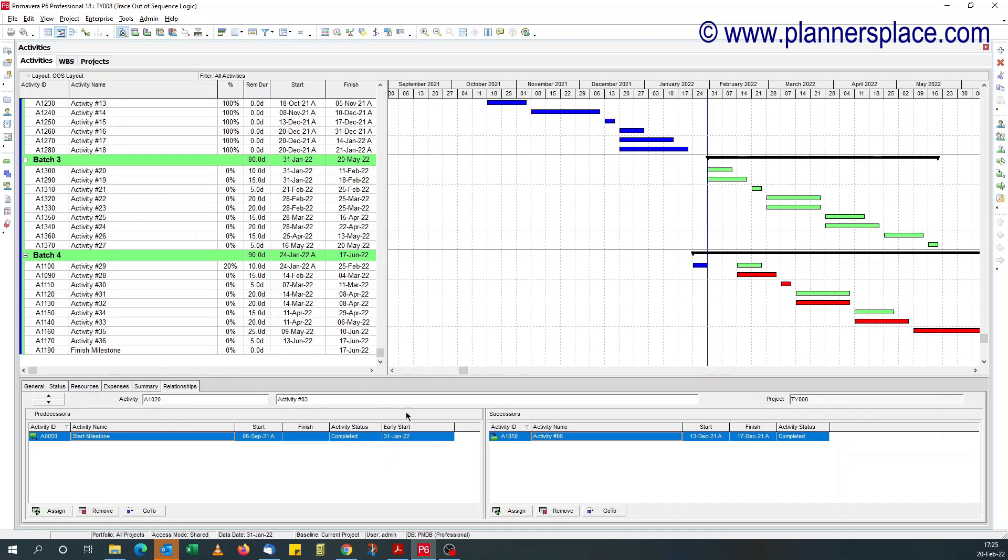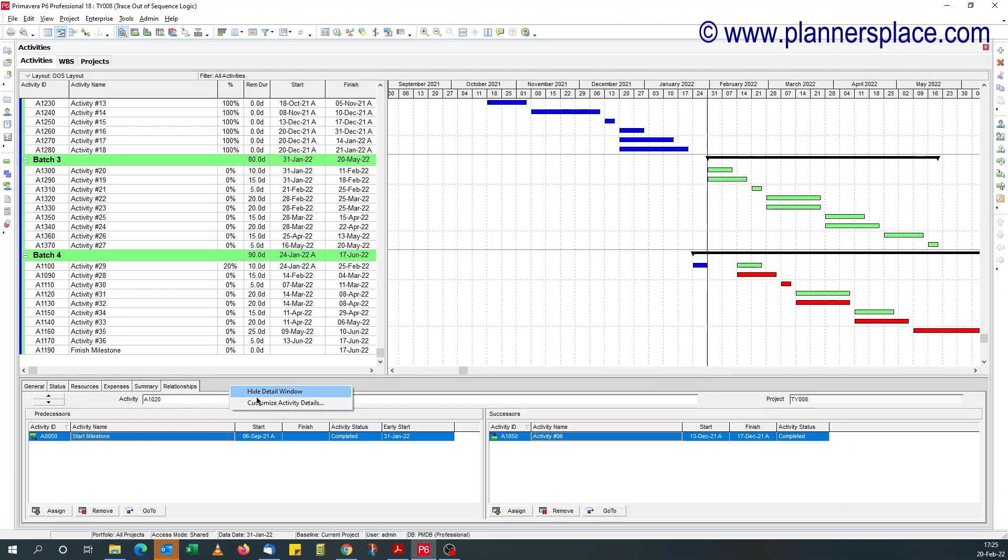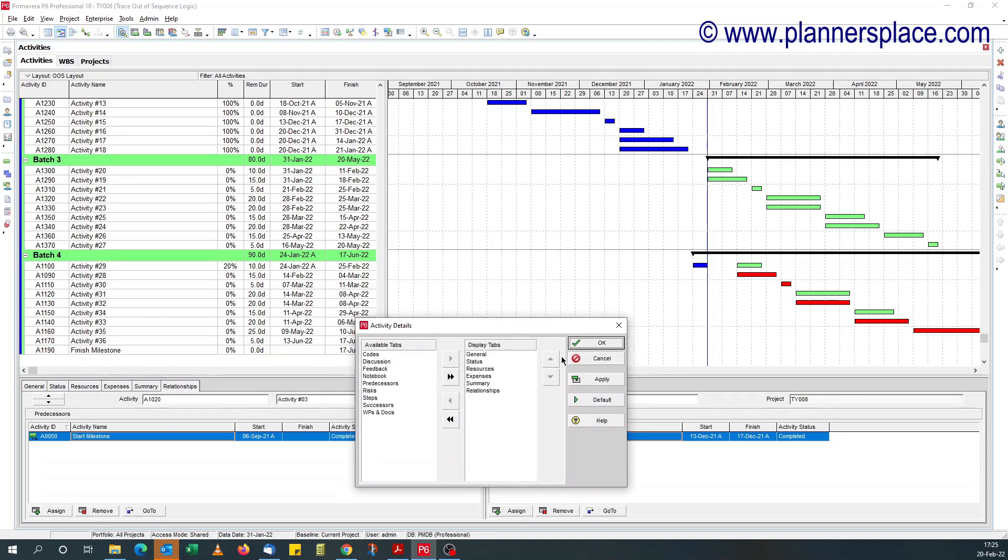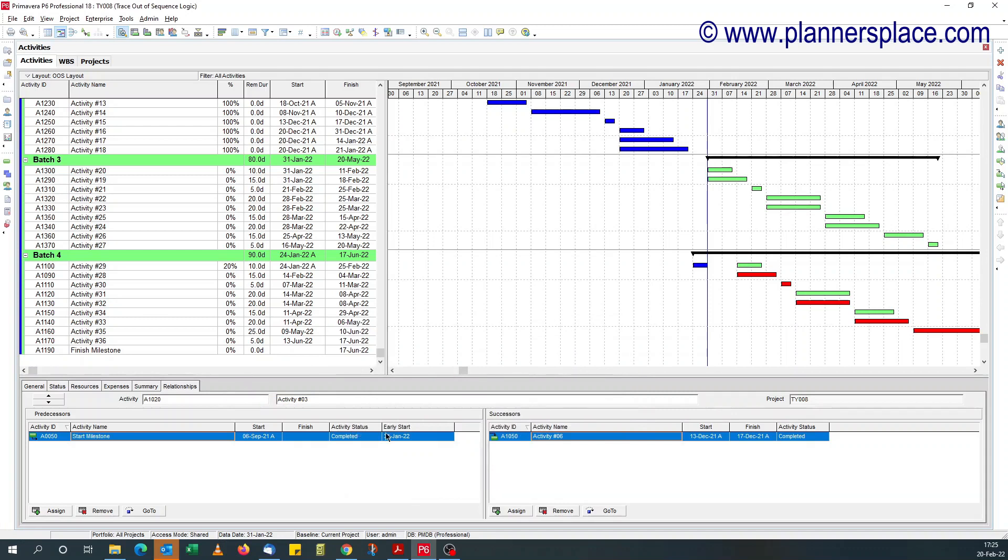Just add the early start field to your predecessor tab. You either use the relationship tab to the predecessor section, or if you've got the predecessor tab on, just add the early start date.